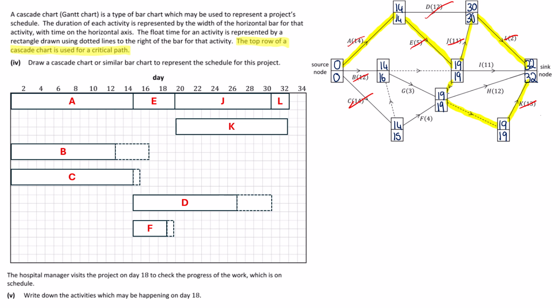And that's F. And G starts at 14 and lasts 3. That'll bring it up to 17, but we then have that extra flexibility until day 19. So there's G with its duration of 3, starting at 14, and then we're going to bring this up to 19. And so then that's G.